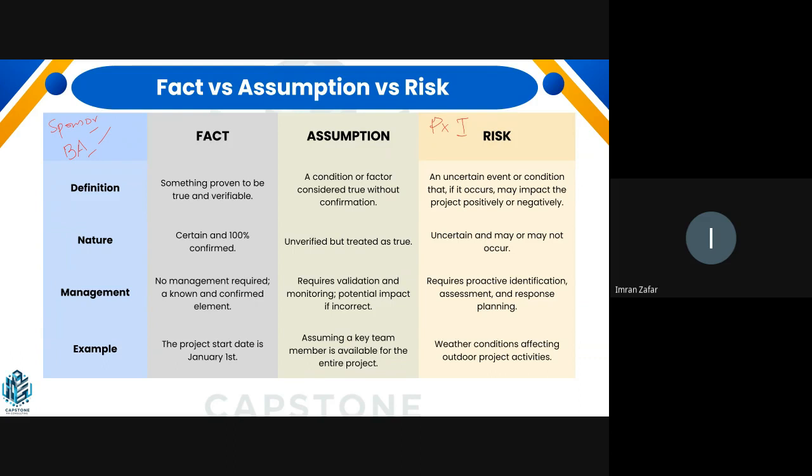We see, okay, these are the high level risks that are identified. These are the high level assumptions. And then we take those forward. As we start making our plans, we see some more assumptions coming up, some more risks being identified. So we keep updating the assumptions log and our risk register and even our stakeholder register as we move with our project. Okay, thank you.